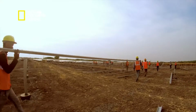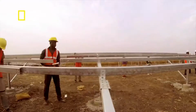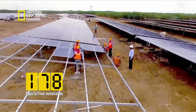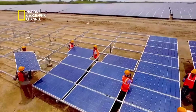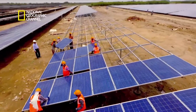After all this heavy lifting, the engineers finally started installing solar modules only in the month of October 2015, and they had set themselves an initial daily target to install 3 megawatts a day, so that in 6 months, and with a little push towards the end, they complete 648 megawatts. And internally, we kept 3 megawatts as a benchmark for us to develop this plant. But many people were still laughing at us. How can 3 megawatts be done?